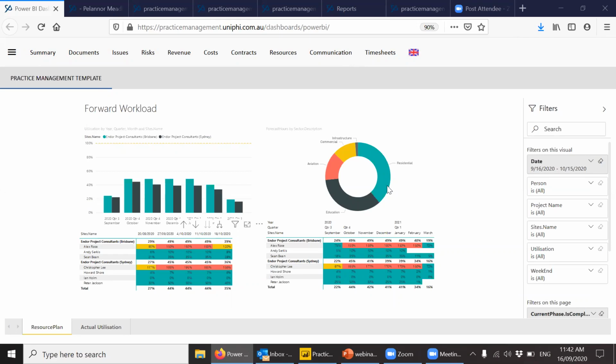So yeah, what's interesting about day-to-day and long-term is, if people do their timesheets as a forward timesheet, like I showed right at the beginning, that feeds into the resource planning profile for that period. But then you can have the months out, 2, 3, 4, 5, and 6, coming from the resource planning screen. So we've seen 2 separate screens, the timesheet forecast screen and the resource planning screen. They interrelate, they connect, kind of like linking cells in Excel. If someone does a timesheet forecast, that will update the short-term resource plan, but the longer-term resource plan will still be there.